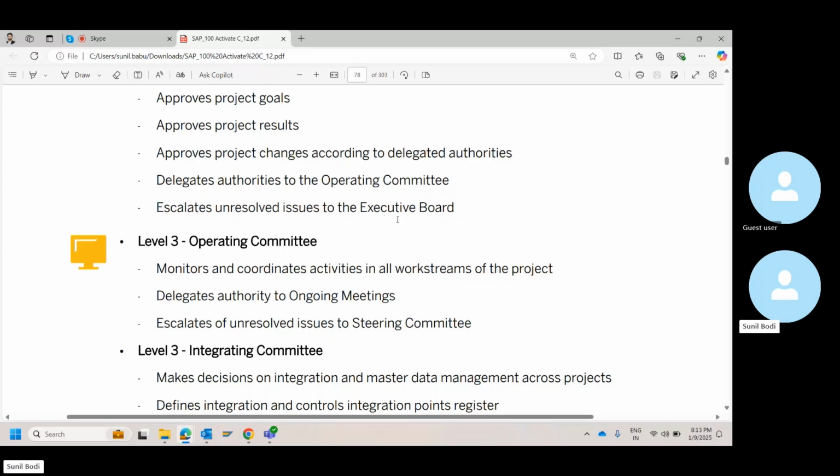It is a large scope. I will not be able to deliver. It's an unresolved issue, and you have asked them for additional money, additional team. Then that becomes an escalation that goes to the steering committee. The steering committee says, okay, we'll discuss with the board and come back on whether we can secure some budget. Then they will go talk to the board and come back. It's all part of the steering committee's job.